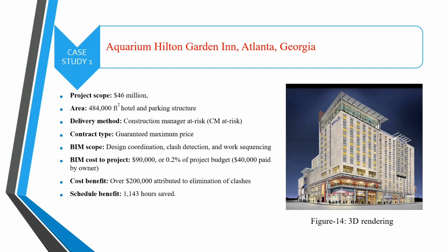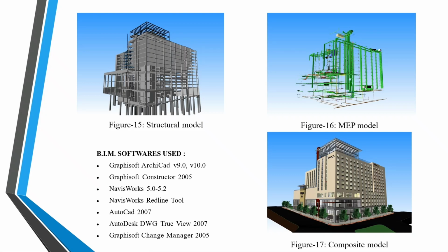This analysis, in combination with outstanding cooperation between architects, engineers and contractors during the design phase, resulted in the successful implementation of BIM with overall savings of around $600,000 and 1,143 work hours. The 3D models were used to communicate with the owners and also in early decision making, with a substantial benefit for the construction phase. Finally, the documentation of the building and its correspondence to an accurate digital model provided a valuable database for building maintenance.